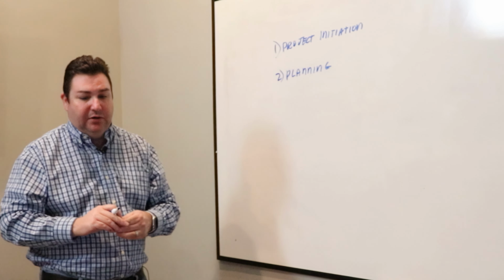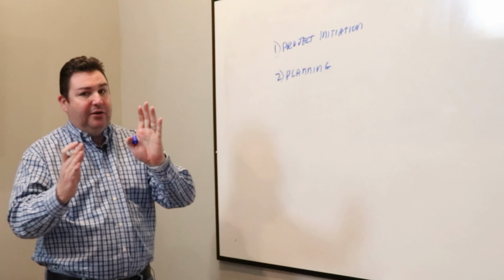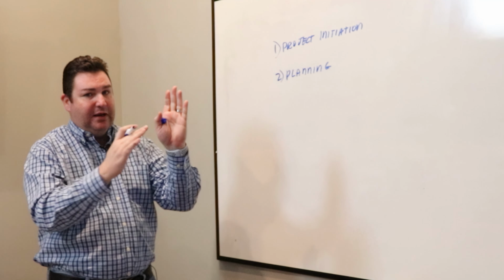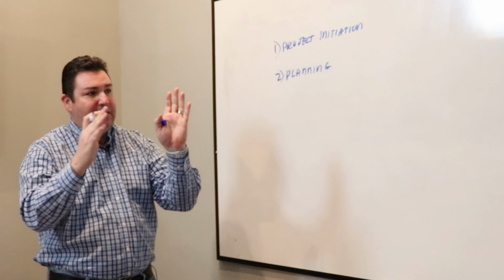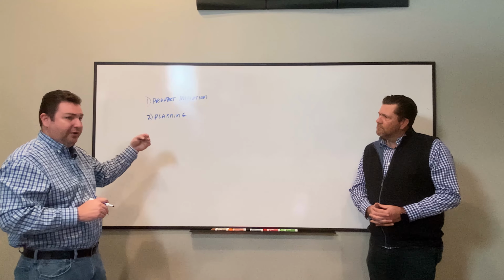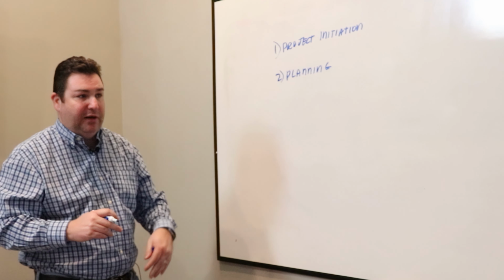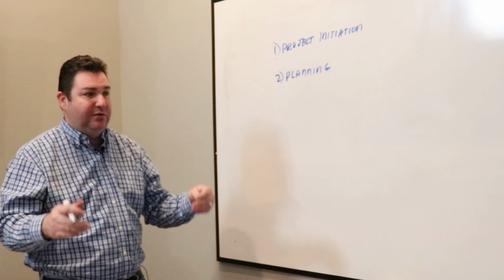You're going to start to refine your costs as part of this, your financial analysis piece. You're going to do that kind of as you go. Establish that detailed schedule and your detailed timeline, because you really start putting tasks together with their dependencies and say this task starts next week and it's completed in 2 days, and immediately following that task we can start the next one. You start to introduce some risk planning, because you're starting to understand more about the project and where the risks are introduced. And then finally, you're developing some QA and QC procedures.